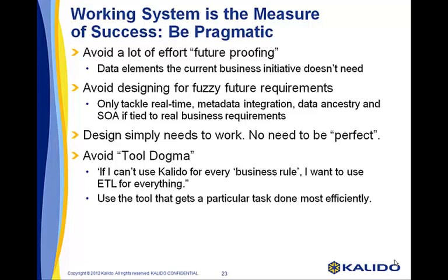These are all things that change drastically when there's full business involvement, because the usage of the data is taken into account. It could be used for closing the books, and you need to reconcile to the penny. However, you could also have the case where you have a few exceptions that do not reconcile, and a business person decides that due to the use of the data, those missing exceptions will not affect the decisions that they make. So we move the system into production with the known limitations, and a future project that requires 100% of the data to reconcile will take on the task of dealing with the exceptions.